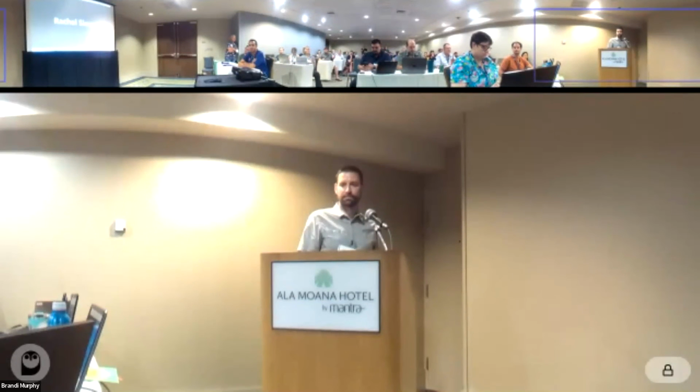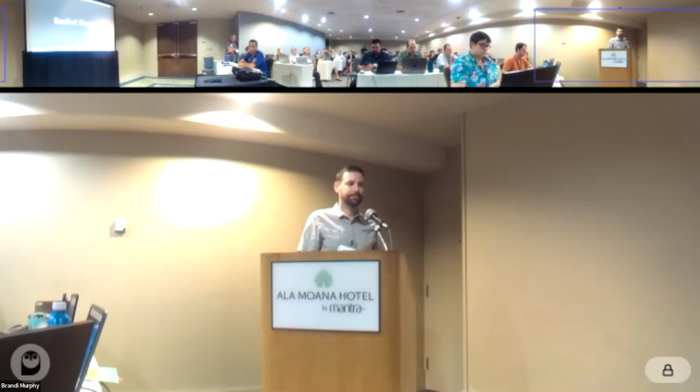And keep in mind, we're going to do it bit by bit. So it's not like you have hours of downtime. We bring everything up, make sure that the internet side works properly, and test that the public network will get internet access and everything still works. Only at the very end of that do we cut over the LAN side. And then the handover is important. I would say carve out at least a day or so. Realistically, you're never going to have a full day of just handover time during a port stop.